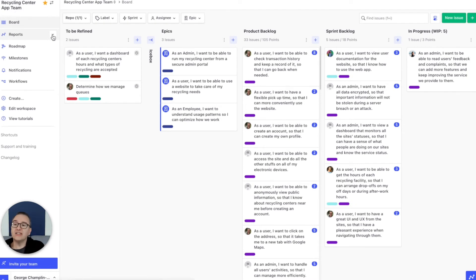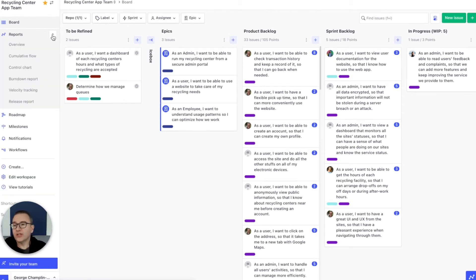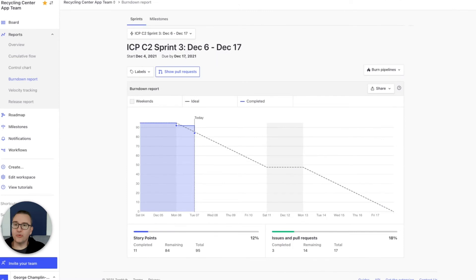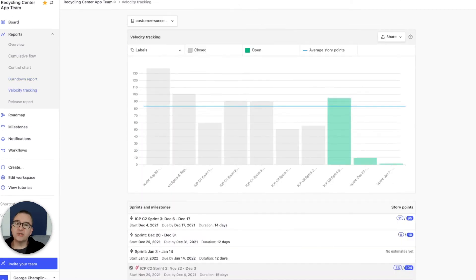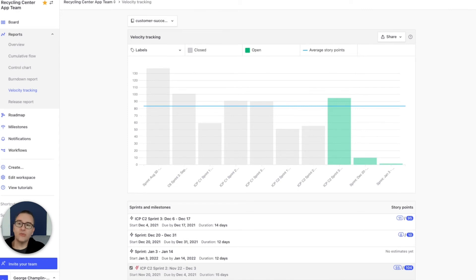Once you're in sprint, ZenHub has a full reporting suite. Let's have a look at the reports. Okay, during a sprint you're going to want to check your burndown report. This is how you check whether or not you are on pace. At the end of the sprint, you can check your velocity tracking report to understand whether or not you are on pace or off pace over multiple sprints.